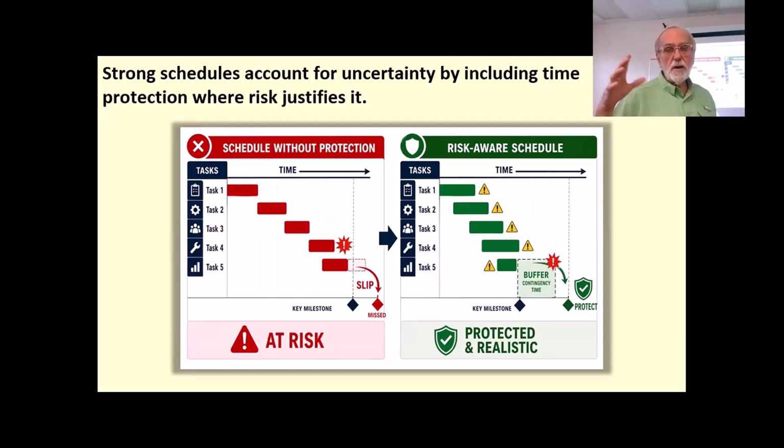And buffers basically give us some breathing room in the schedule to make decisions, right? It's kind of like on the cost side, we talked about in the cost where sometimes the sponsors can say, hey, the project manager or the team can approve cost overruns up to a certain percentage. That's kind of a buffer in the cost management. You're on a $1 million project and you say they can approve everything up to $10,000. Okay, so you're giving yourself a $10,000 decision buffer there. And it's the same thing in the scheduling.